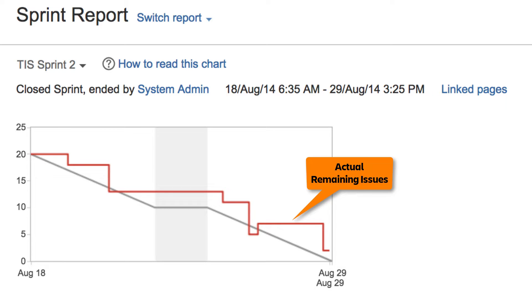This line will also reflect any issues that are added or removed during the Sprint. The condensed burndown chart is board-specific and will only include issues that match your board saved filter.